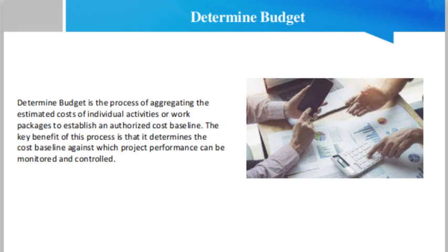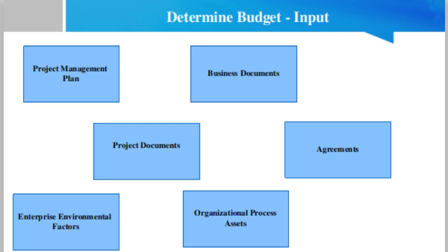A project budget includes all the funds authorized to execute the project. The cost baseline is the approved version of the time-phased project budget that includes contingency reserves but excludes management reserve. So first of all, we shall discuss the inputs. Friend, these are the inputs for this process of Determine Budget. First one is the project management plan. The project management plan basically includes